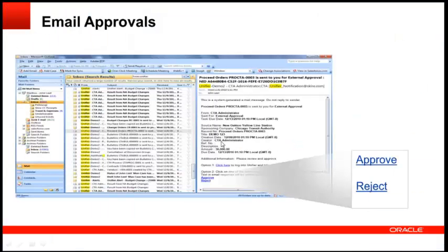We've tested this. We've actually seen it work. I got a notification about a change in the budget. Instead of going into Unifier and pulling up my next step of the workflow and executing it, I just approved it from the email, and it automatically created a reply email where I could add my comments, and when it was sent back into Unifier, it executed the next step of the process, which actually was approving a budget and posting it to the cost worksheet.